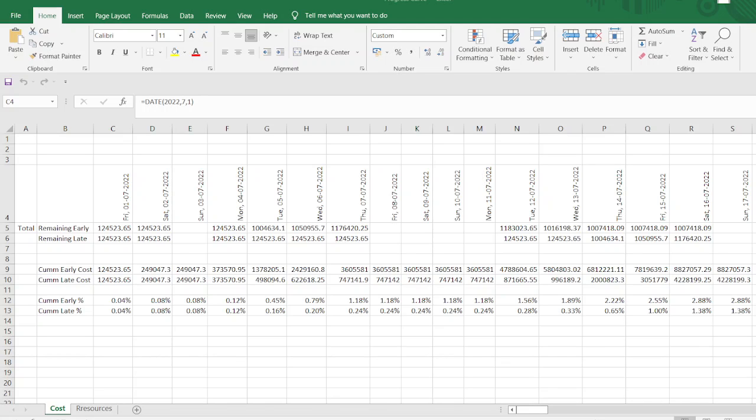The scope of this video is related to the generating the progress curve itself. So as I explained in my previous two videos, when we are making the weekly and monthly curves directly from Primavera, Primavera gives us the values at the end of the week or at the end of the month.